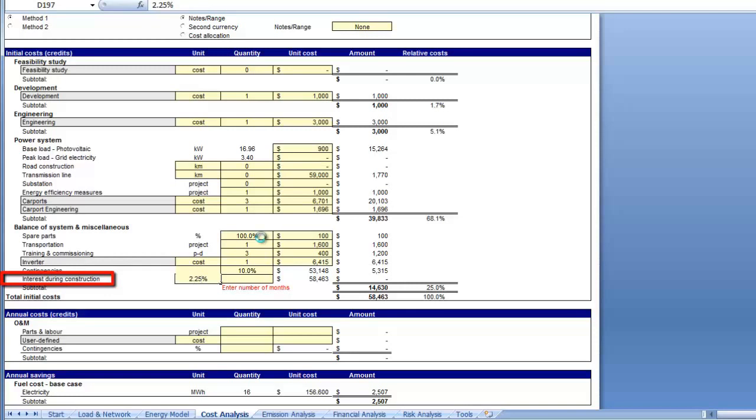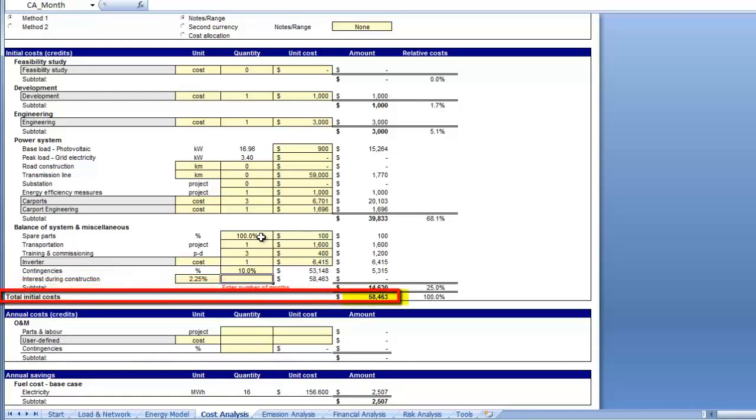With an experienced installer, this 17 kilowatt solar system can easily be built within less than a week. On the other hand, there may be payments that need to be made in advance, such as retainers for project engineers, consultants, and solar equipment manufacturers. Thus, we will assume an extra 3 weeks for construction, bringing total construction time to 1 month.